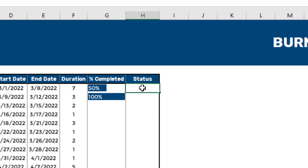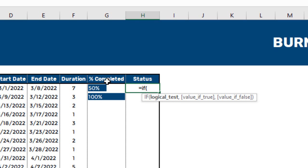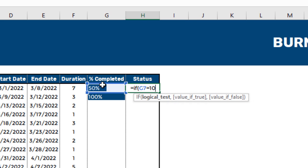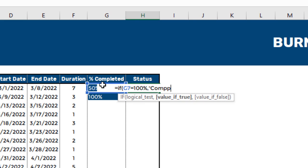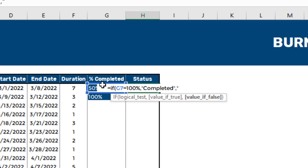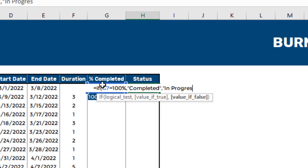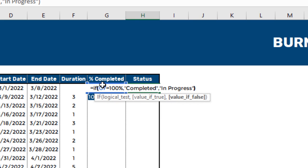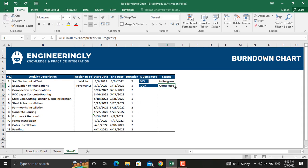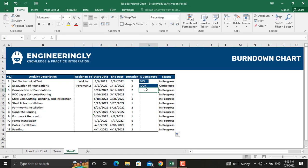I'll write down the formula: equals IF, and if the value in this cell equals 100%, then it should display 'Completed'; if the value is anything other than 100%, it should display 'In Progress'. Close the parenthesis and press Enter. We will then apply this formula to all rows.